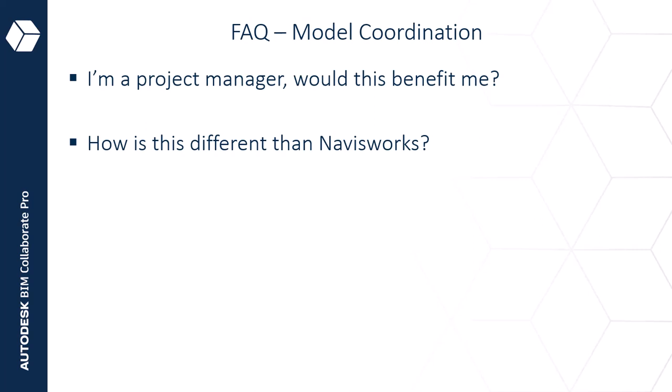Here, whatever's happening from a coordination point of view is visible to everyone who's got permission to that. And if I update something, I upload my new model, it's on Friday, those clash reports are automatically updating. So automatic and really a little bit more transparent and easily accessible.